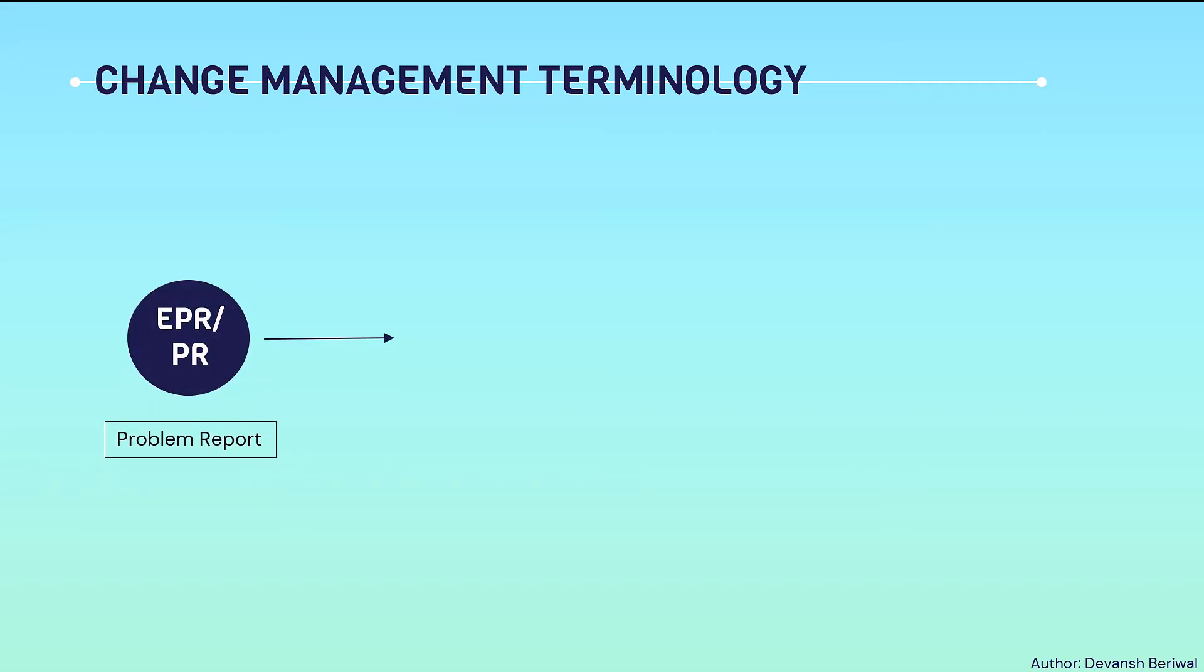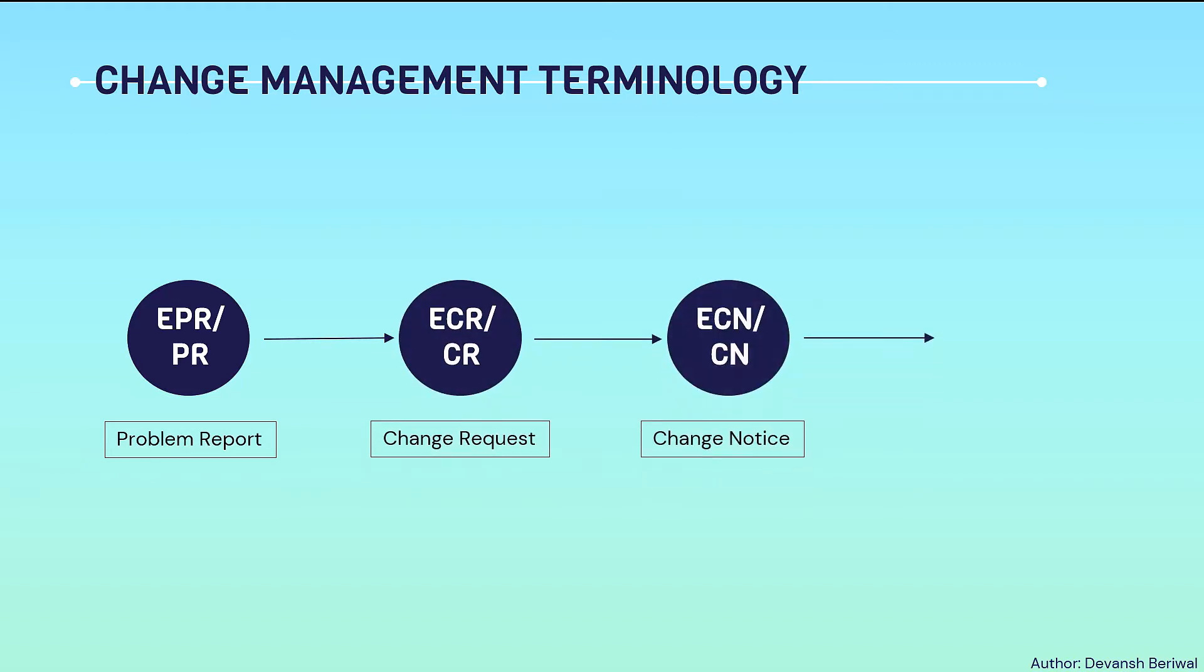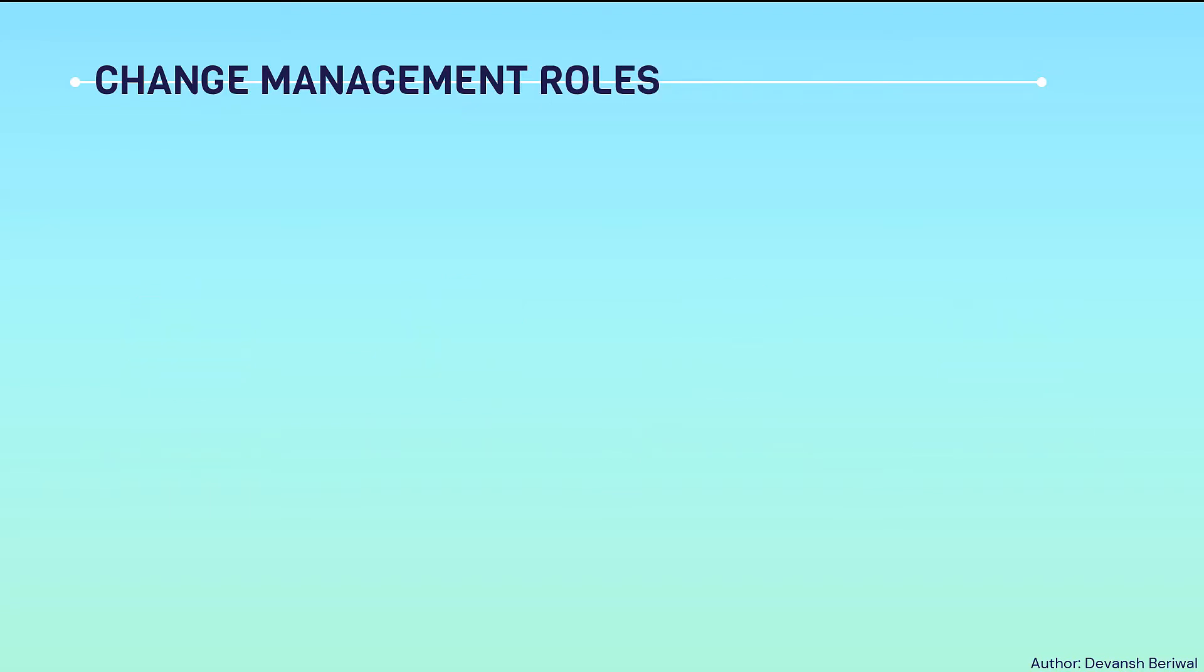Firstly, an engineer raises a problem report. Then from problem reports, change request is created, and from change request, change notices are generated. From change notices, change activity is automatically generated.